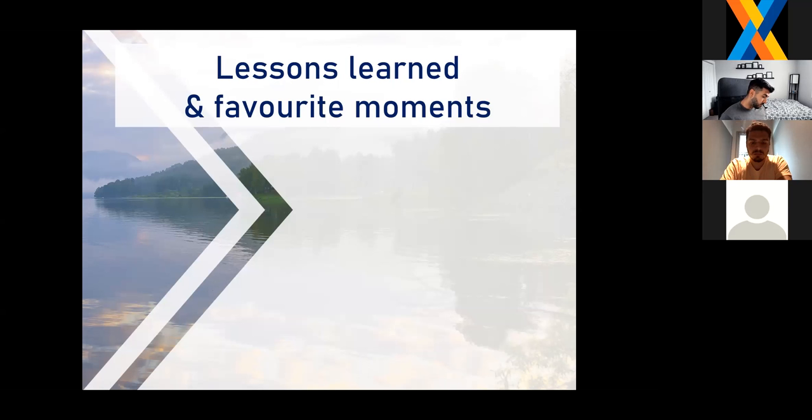So that's a big lesson learned and a takeaway from this team, and it's impacting my work with wildfires today. We faced a similar scenario on the application we're building now, where we could have gone much deeper, pulling lots of different weather data sets into the display. Instead we've chosen to only move forward with two for now until we see the end-to-end workflow of that application, and then we'll build out the rest of the data sets. So big lesson learned for me. Also, this was my first experience on a purely technical team as a Scrum Master, so there's a ton of lessons learned that came with that.